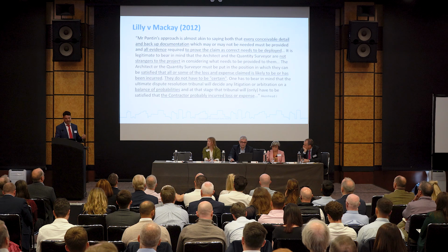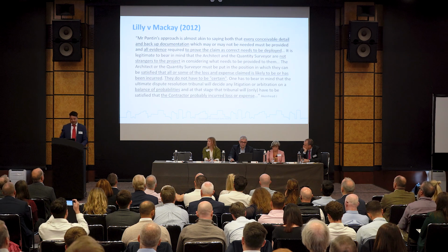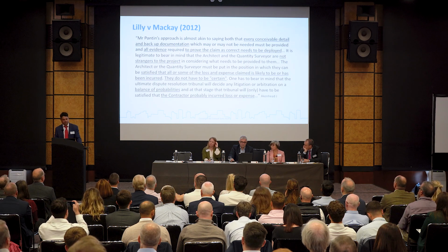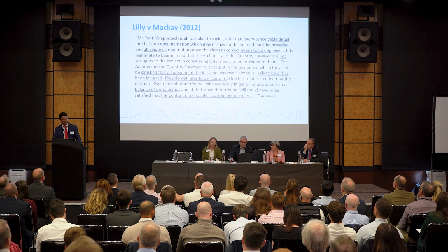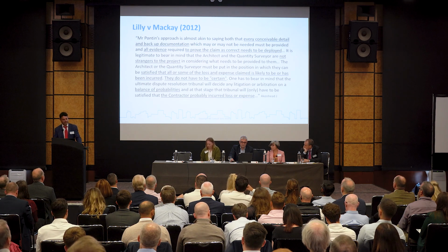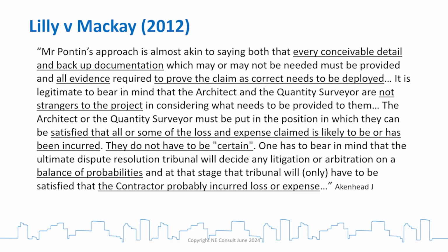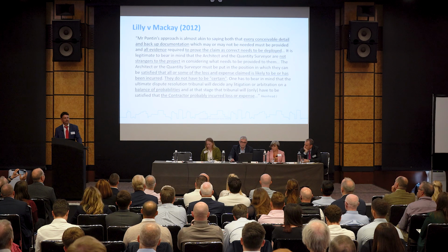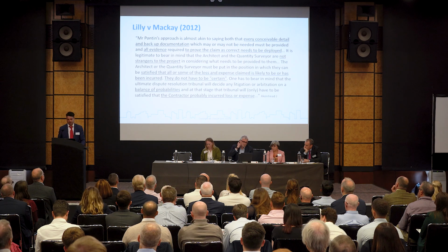Another case, Lillian McKay. You can see the criticism here. Every conceivable detail and backup documentation which may or may not be needed must be provided, and all evidence required to prove the claim is correct needs to be deployed. And the judge pointed out that this is absurd. A position where you might have a £1 million claim, and for the want of detail on £10, you deny the whole claim. Absurd is the word he used.